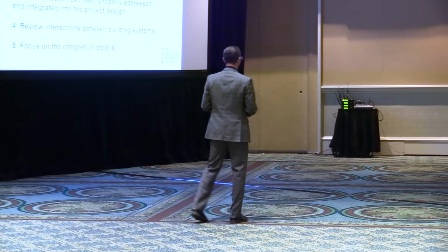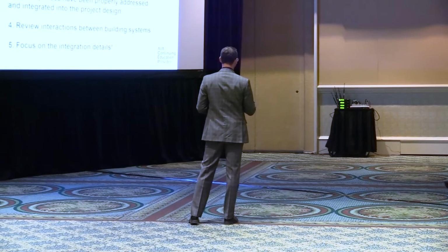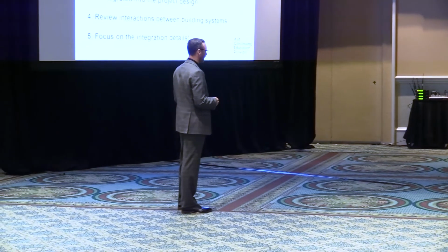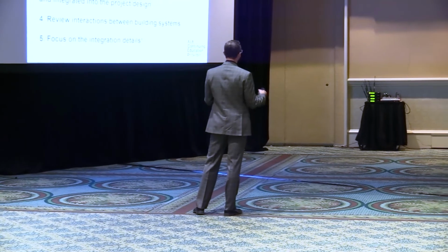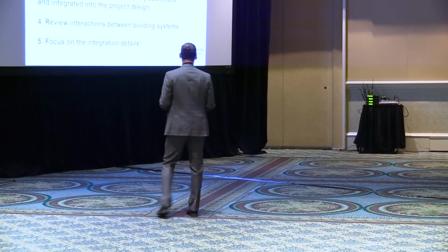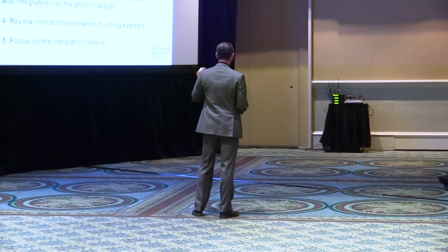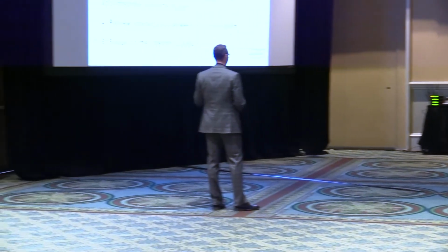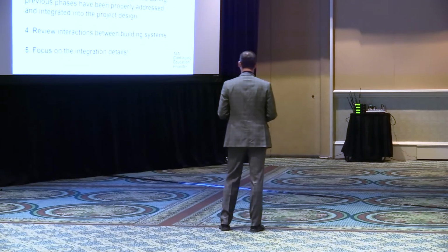I think that we need to not only keep a checklist of everything that we have highlighted as far as drawing review is concerned. I think we also need to keep those same types of checklists or documents to also address all of those pre-design issues that we hopefully have been involved in. Like I said before, with all of those material interface issues, R-value issues, those things get lost in the mix, and they're incredibly important. And we have to keep track of those just like we keep track of all those other things that we list on drawings.